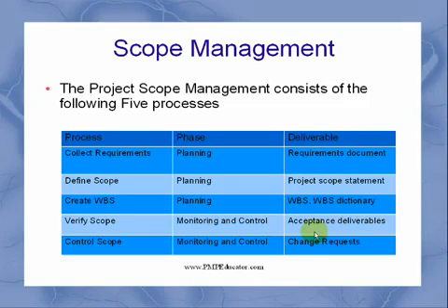Notice that there is no process in scope management in the execution phase. Let me say it again: there is no process in scope management in the execution phase. All the processes are either in the planning phase or in the monitoring and control phase.